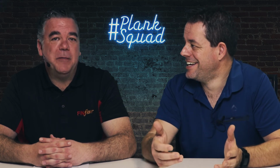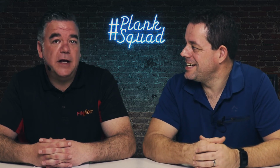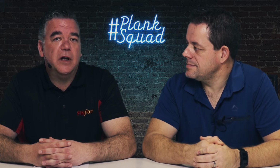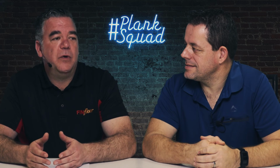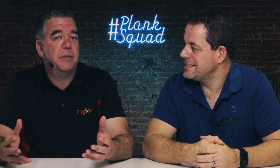Yeah, it drives me mad because always the first question I ask is, would you have put a carpet in at this stage? And no, never. So why did you put your wood floor? Unfortunately, I think these days it's got a lot to do with how we build and how we have to do draws with our banks. And if, unfortunately, floors are put in too early so they can show the progress on site, which is fine, but if you still have wet works and a whole load of other work and contractors coming in afterwards, please can we use the right protective products out there?